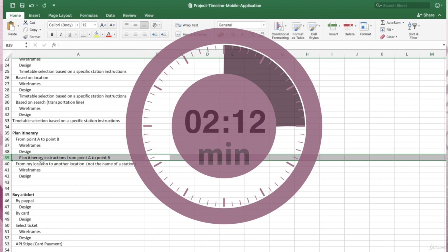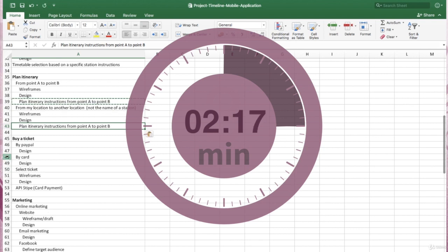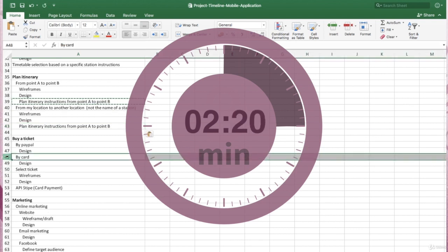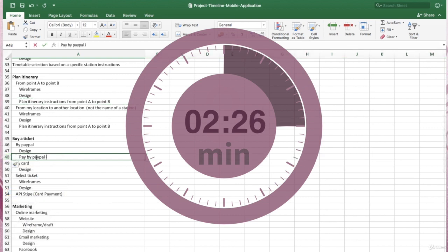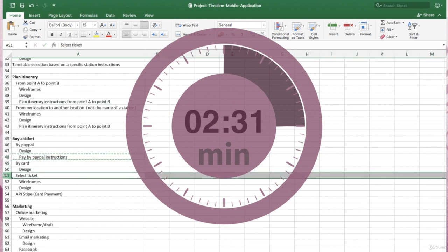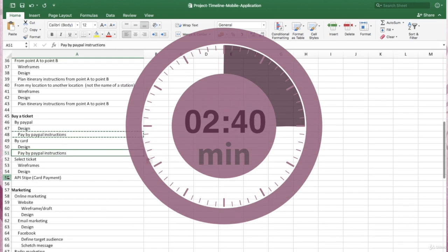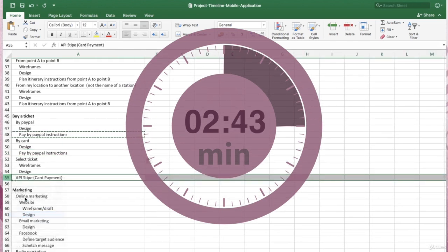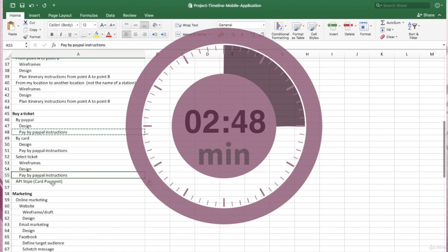for a certain certification and you need a reference, then you want to get in touch with the person who has to give you the reference, and to allow this person to have time to prepare and to write you the reference. So, if you put all that in a project plan, you are not going to forget it. You are going to allocate enough time to this person to prepare the reference letter, and it will also help you build a relationship. But if, for example, you go a few hours before the deadline and you tell your boss, look, I need a reference letter for this application, that's not very nice. No, you are not going to like that somebody does that to you either.